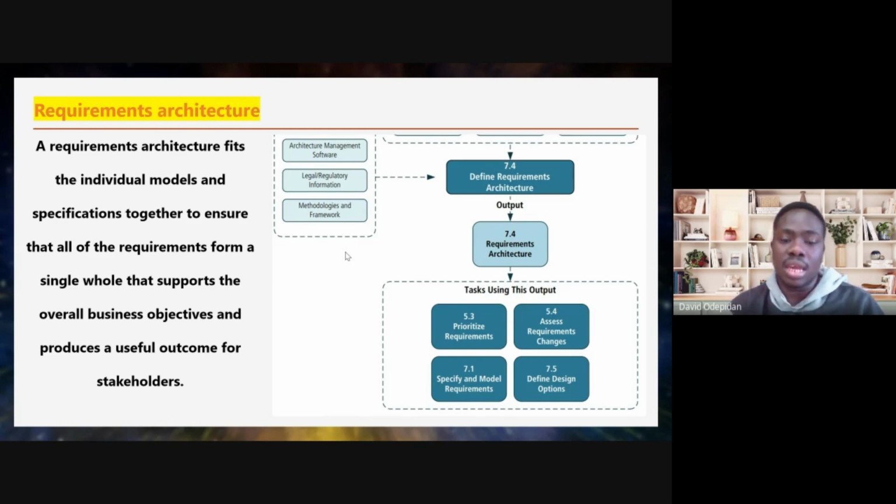Let's say you have 12 sprints. If you are creating a platform, in the first sprint, before the developers can do anything, the UI UX guy should have come up with a design. So I'm putting this at sprint 1 or sprint 2. At the end of sprint 1, they should have completed their design for you to review.